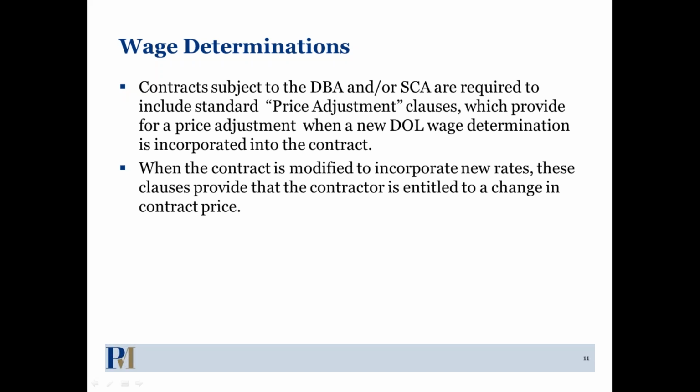But ultimately, if they disagree and they put in an old one, that's what governs. And the only agency or entity that can fix that is the Department of Labor. So if there were, say, a complaint to the Department of Labor, and the Department of Labor came in and looked at it and said, no, the 2017 wage determination should apply, not a 2015 wage determination, the DOL can, per regulations, require that the agency change it and make it the new one, or whatever one the Department of Labor applies.